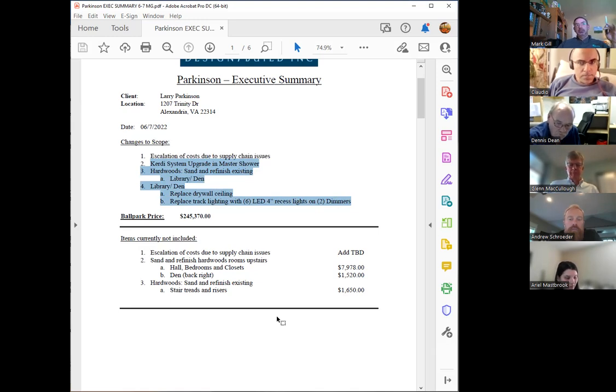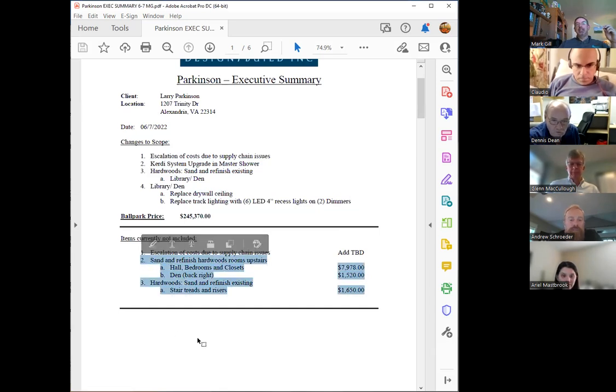Okay, Joe. And it was really nice, Ariel left the remaining options here. The nice thing about leaving the unchosen options in place is it's clear to the client he did not choose them. So when we go back to contract later and we say, I thought you were doing the rooms upstairs too, oh, here's the executive summary. If you remember, they were not chosen. And that actually happened at Parkinson. You're correct.